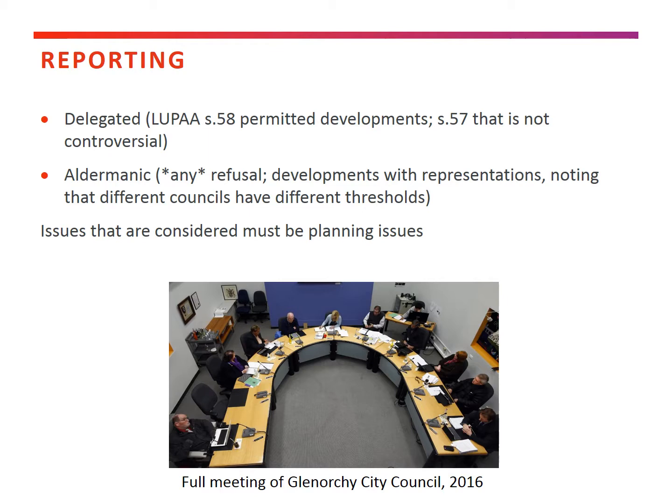The only other thing to mention here about reporting is if the council officer is recommending a refusal, then it has to go to the Alderman to decide. And as part of this reporting, if people raise issues that aren't related to the development, then the planners can't have regard to those issues. So people are free to say whatever crazy thing they like, but if it's not related to a planning matter, then it will tend not to go into the report.